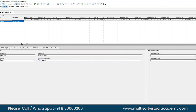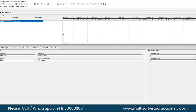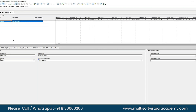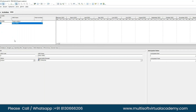Click on WBS — it will open the WBS page. You can see the vertical partition dividing the WBS names and the Gantt chart. Drag the divider to the right to give more space. In the WBS page, the highest level is your project name. Right-click there and click Add — a new WBS is added. Numbering is handled automatically; we just worry about naming. Name it 'Engineering' and hit Enter.